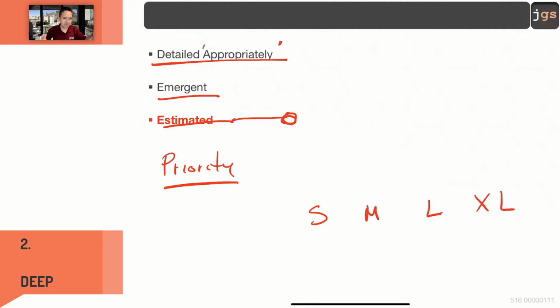It's like, well, this is an epic, okay, it's complex, it's not small, but considering that it's an epic, it's a small epic, a medium epic, or an extra large epic, used to give an estimation. The stories, on the other hand, receive an estimation that is more numeric, 1, 2, 3, 4, 5. And we're going to talk about the scale. So yes, even the epic needs an estimation, even though the scale is a little bit different.